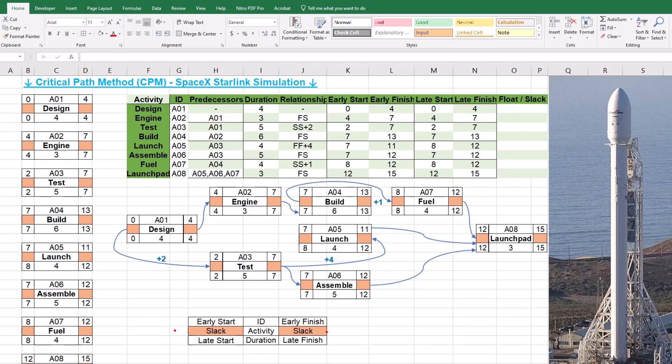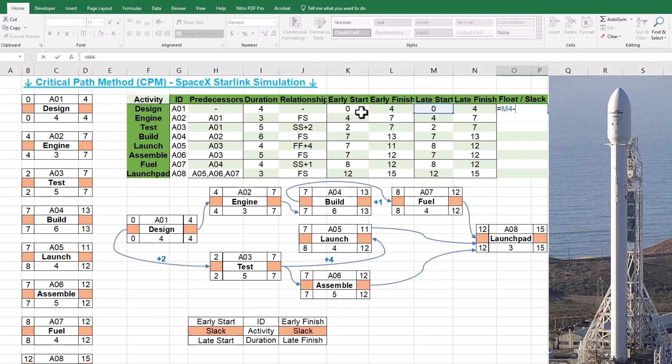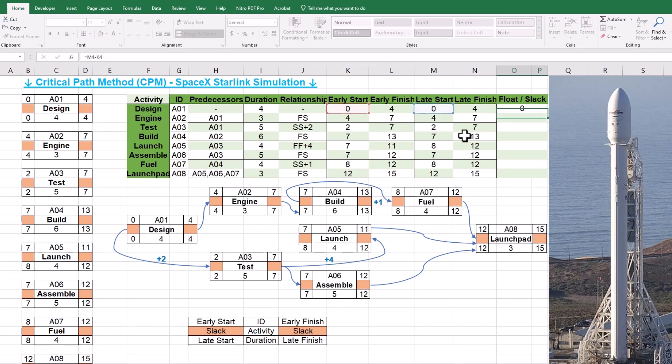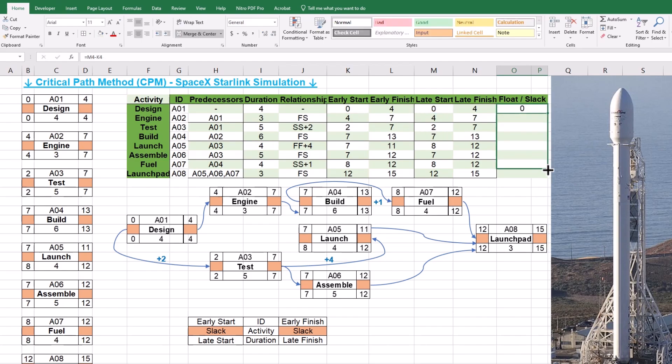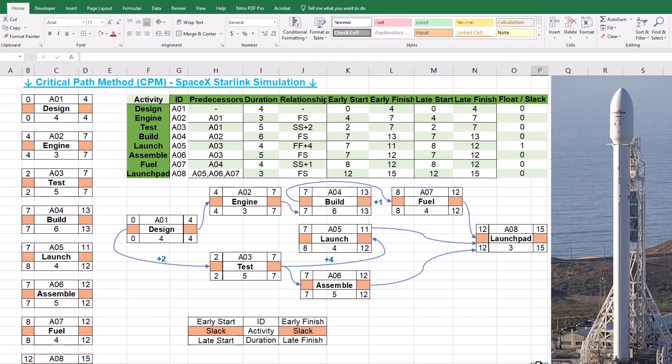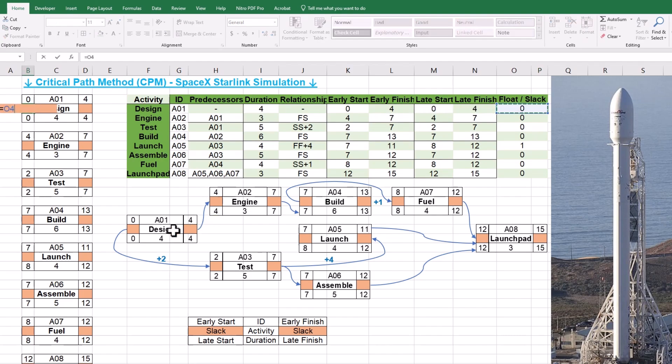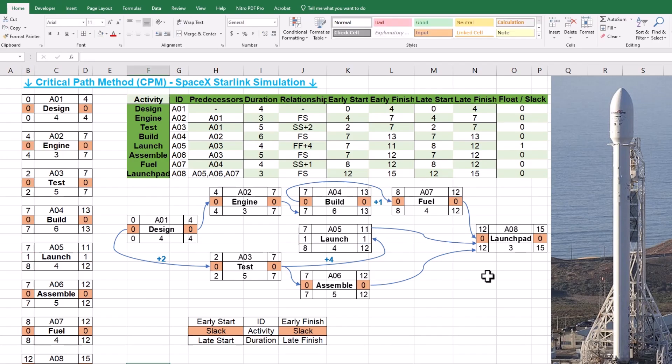The last step in solving our CPM is to find activity slack or float. Values can be calculated by finding the difference between late and early starts for each project activity. Subtracting early finish from late finish will also have the same results. We should link slack placeholders in our left-hand side templates to the project data table. Critical activities are automatically highlighted since we applied conditional formatting earlier. Please note that all project activities are critical except A5, which has a slack of 1. Remember that even small delays in critical activities will delay the entire project.